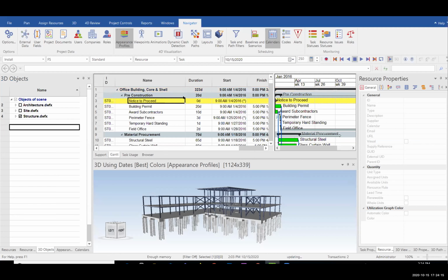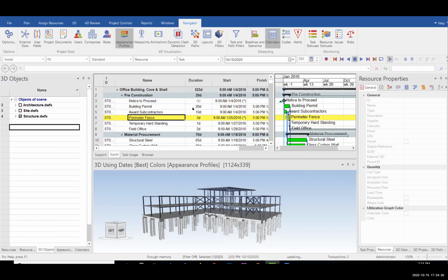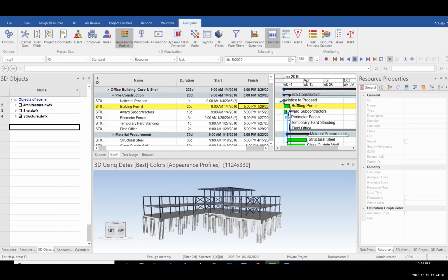It is the same engine as P6 and Microsoft Project, which means almost whatever you can do in P6 and Microsoft Project, you can do in Synchro. It's very functional. You can change the duration of the project and the name of it. You can change the start date and finish date. You can even change the links, which are the logic between these tasks.